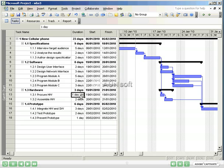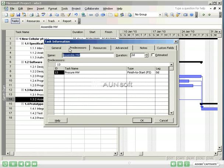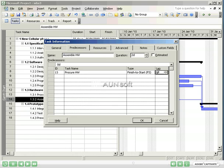To enter lag, double-click on the task which contains the predecessor, in this case, assemble hardware. Select the predecessor tab. Note that there is a lag column, and by default, the task has a lag of zero days. In this column, enter the lag for the task, in this case, five days to wait for the hardware to arrive, and select OK.